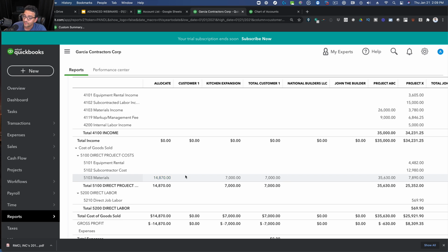And again, the reason why I'm doing this is because maybe I cannot tie one transaction or multiple transactions to a specific job. This happens very often when people buy inventory materials, where they buy materials, buy materials, buy materials. They don't know what job it's for. It's glue, it's paint, it's small tools, whatever. They send it all to job cost, all to allocate. Then they look at everything they spent for that month or that week or that period, and then they go figure out where that goes. So again, it's not as easy as just going back to the original transaction and fixing it, because there might not be a one-to-one relationship to that transaction.